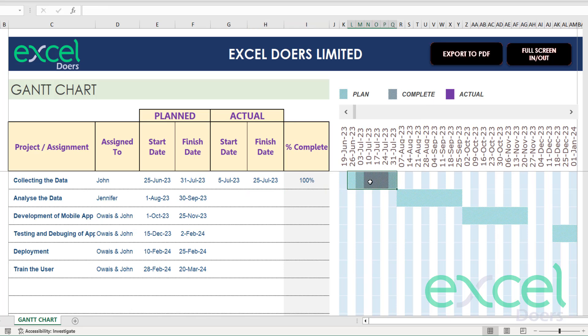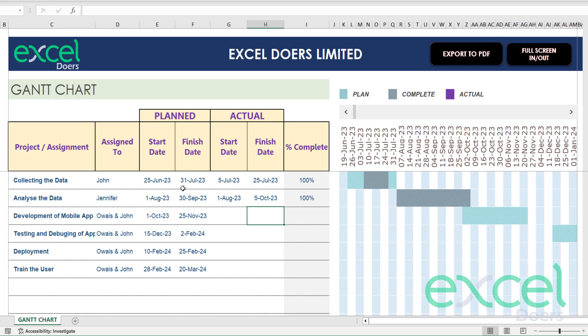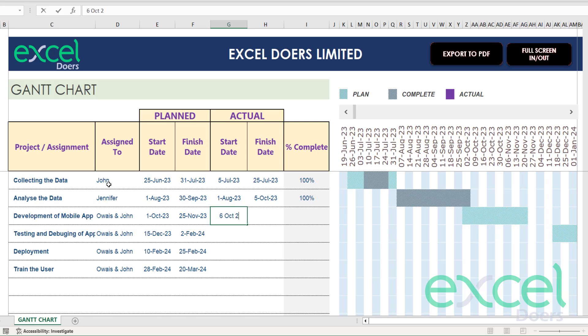So this was my planning area but the task was completed just within this period. The analysis of the data started as planned on 1st August 2023, but instead of 30th September it went above the schedule and ended on 5th of October 2023. Now you can see the area is bigger and we have overlapped our planned area.